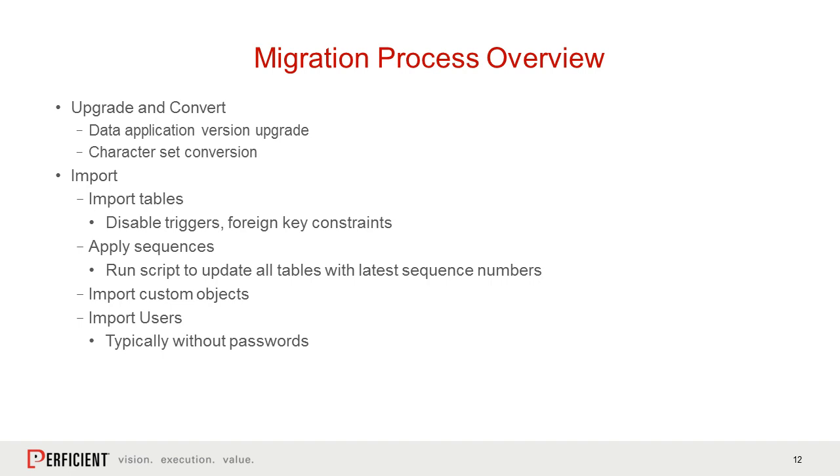So as part of the process, you not only move the data, but you upgrade it to the latest application version at the same time. And so there needs to be this intermediary step, usually involving a staging database, where you upgrade the data so that it matches the structure of the target system. If you don't, then the target application is not going to understand your data. You're going to run into problems. You're going to have a bad time.